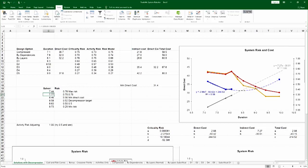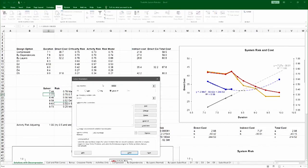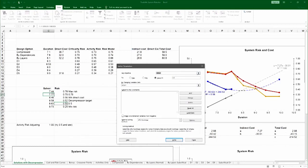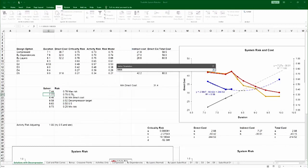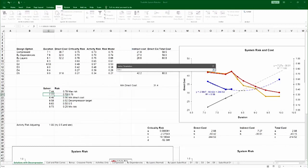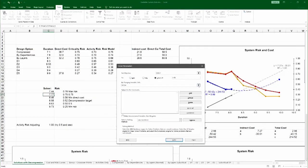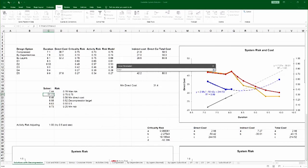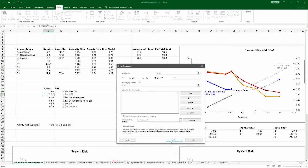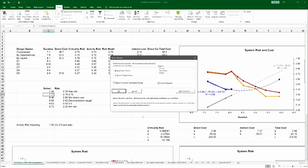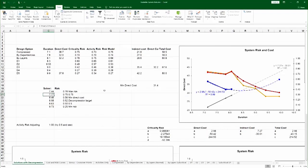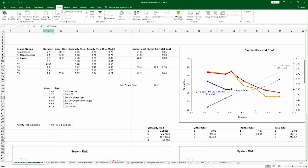Let me demonstrate that. You can go to the solver, point at the target cell, say 0.75 over here, and say I want to get the value of 0.75 on this cell by changing the value of this cell. And when you run the solver, it would actually calculate that exactly. You can also use that to find values like the minimum direct cost. You can find an analytical solution, which is actually what this spreadsheet is doing.